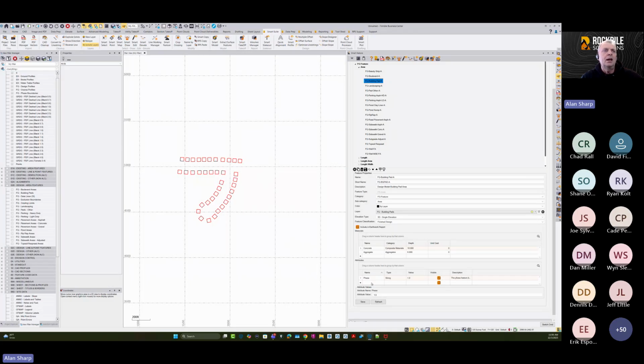And then on top of that, you can add attributes to the feature, and the attributes will appear in the properties pane of the feature, and you can have as many attributes as you want. You can use them for things like phase numbers. So if you want to group all these and say they all belong to phase 1, you can do that by putting a phase attribute on here. When we're doing things like cross-sectional areas for cross-section takeoff, then in here you might want to put a station attribute, and then when you digitize areas of the cross sections, you can say these areas belong to station 1150.00 or whatever as you're building it.